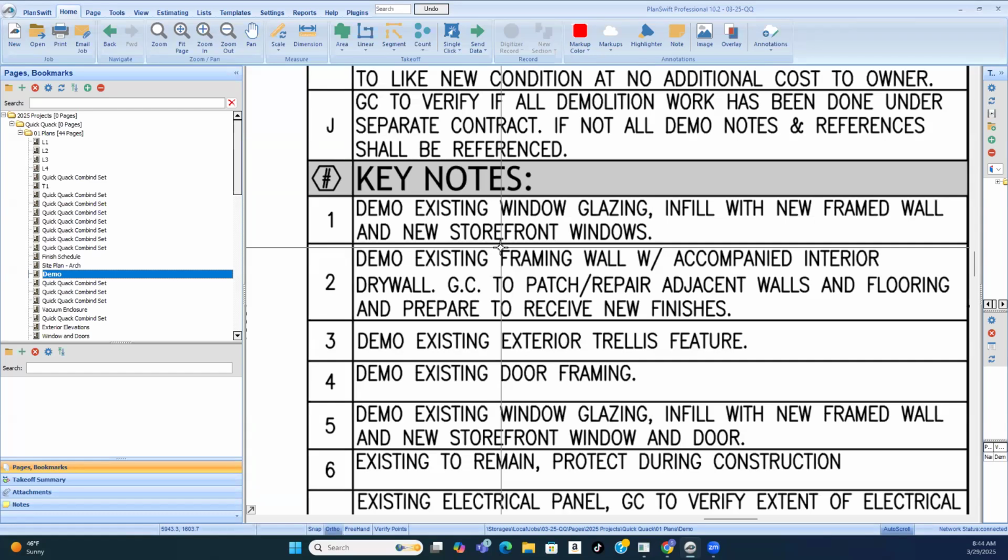Now storefront windows, that's going a little too far. Even when I do estimates for framers, we exclude storefront window framing because that's a specialty situation. Those are specialty frames, specialty windows. A window person would do that 100%. So when I do this estimate, when we shadow each other, I'm going to do the infill of the frame walls, because that's not a big ask to frame a wall. You get a framer, they can fill that in. But the storefront, we're going to exclude that.